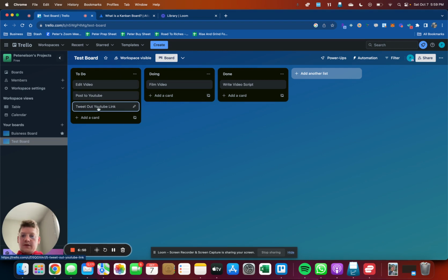So it's pretty straightforward. And really, the only time that you would apply a WIP limit would be to something that is actively being worked on. Your queue can be as long as you want here, and then your list of completed tasks can be as long as you need it to be. Really, we're focusing on where the effort is taking place.